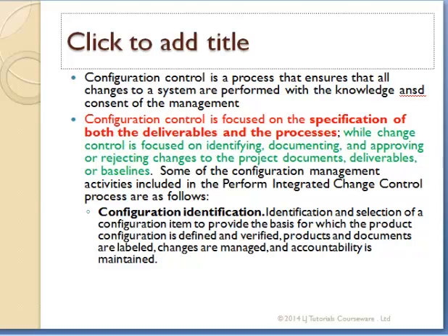Okay, let me also make a clear difference between configuration control and change control. Now let me cite an example. A client tells us to build a house, and it should be yellow. Yellow, remember yellow. Now, someone leaves a project. One of the builders or contractors leaves the project. So now that's going to impact our schedule for about 2 weeks. So we can raise a change request to shift our schedule or our end date. Now that is a change control.